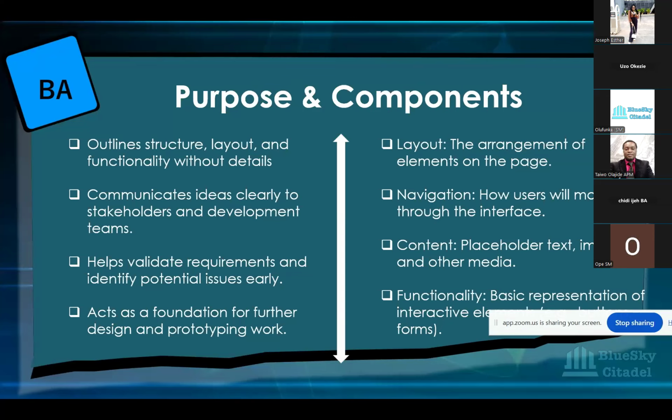If you're wearing a black shirt, the image cannot be purple. The image has to match the actual requirement. So make sure that everything that is in your wireframe is part of your story. The requirement must be documented in your user story, as part of the acceptance criteria, before it can form part of your wireframe.